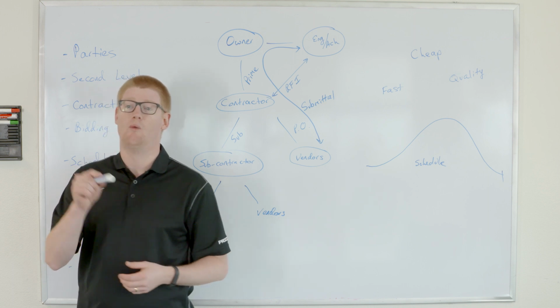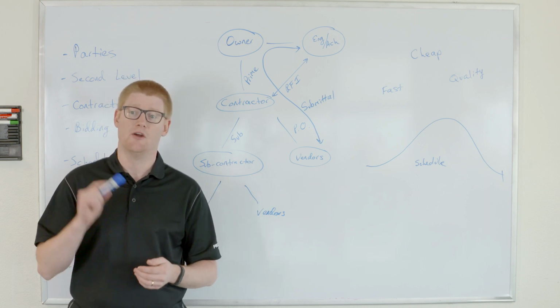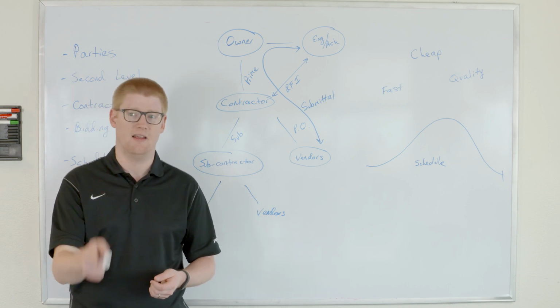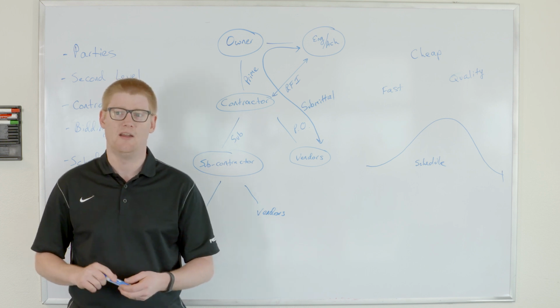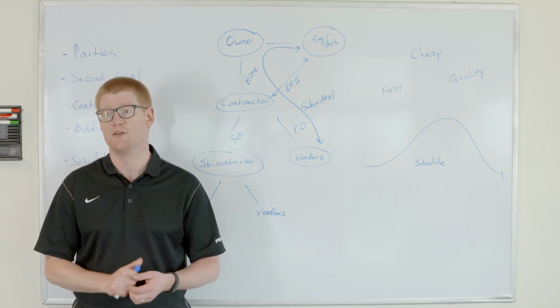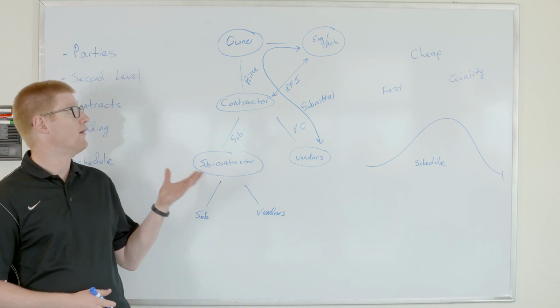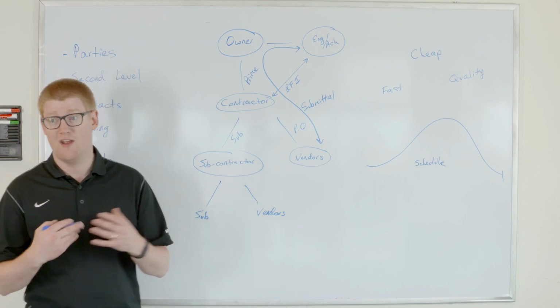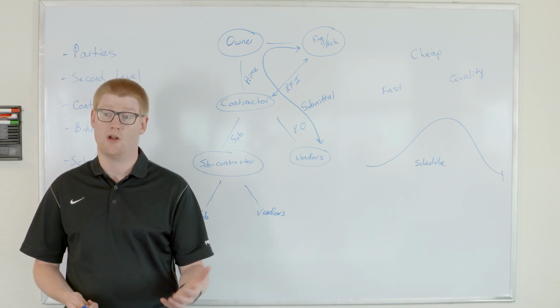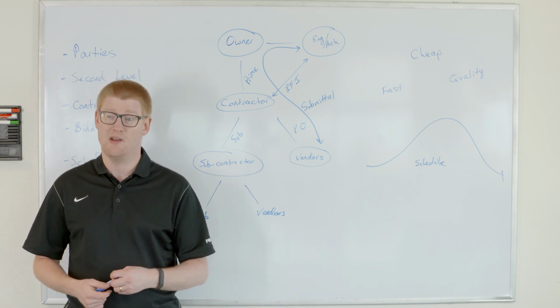That plumber, you're going to walk in after that plumber walks out, and you're going to look around, and you're going to go, he needs to clean that up, he's got to patch that little paint that he scraped, etc. You're doing a punch list. You may not write it down, but that's what it is. The larger the contract, or the larger the project, the more phases and the more punch lists you're going to run during the project, and the more parties are going to be involved.